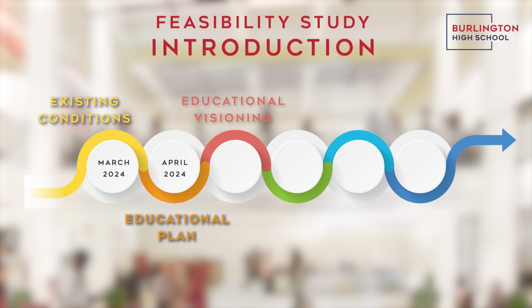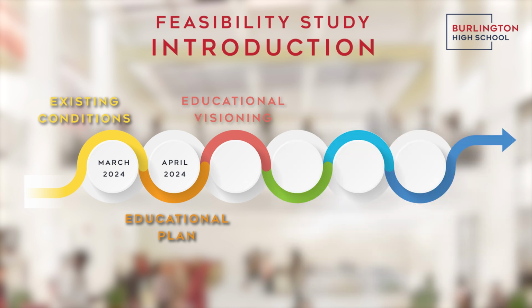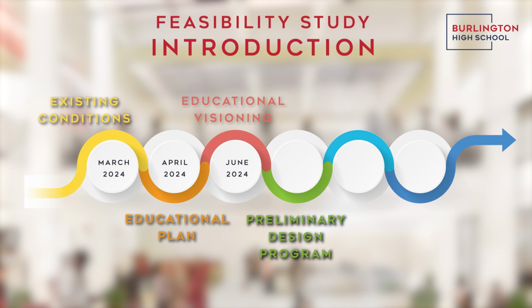The design team has partnered with New Vista Design to collaborate with members of the high school family, including a selection of staff, students, and parents to determine what Burlington High School's priorities should be in a building project. These preliminary sessions were completed in June, but don't worry, there is still plenty of opportunity for input and to make your voice heard. Having gathered and studied these items, the design team, along with district leadership, prepares preliminary concepts for review and approval. This report is called the PDP, or Preliminary Design Program.